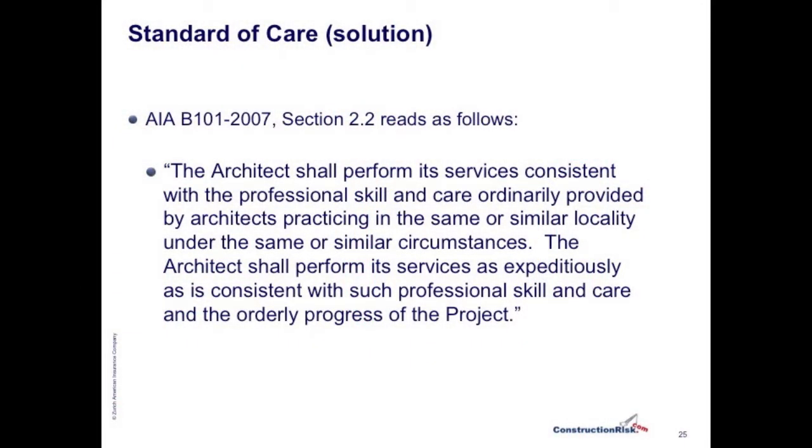The AIA language reads as follows, quote, "The architect shall perform its services consistent with the professional skill and care ordinarily provided by architects practicing in the same or similar locality under the same or similar circumstances. The architect shall perform its services as expeditiously as is consistent with the professional skill and care and the orderly progress of the project." Close quote.